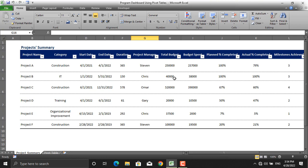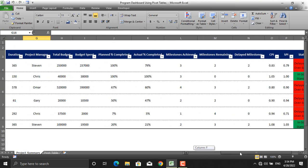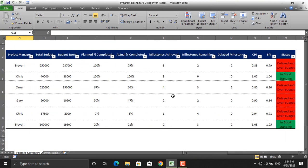For example, I'm going after Stephen. Stephen's project number one: it was planned, the total budget is $250,000, the budget spent is $237,000, and the CPI is 0.83 — it's delayed and over budget.